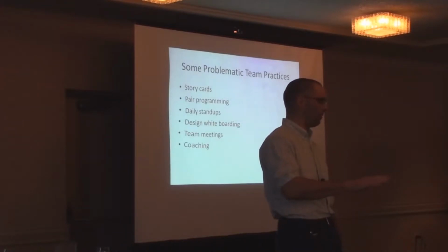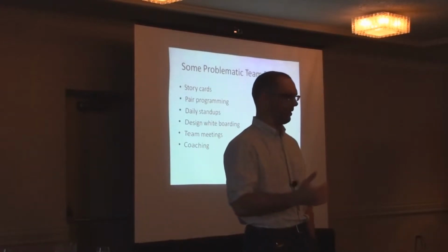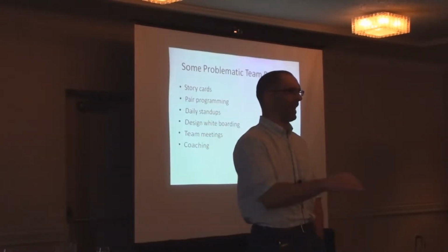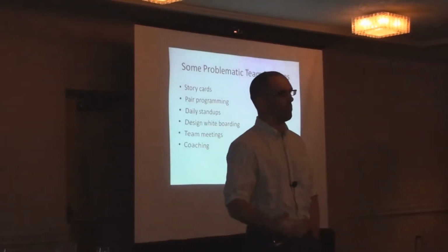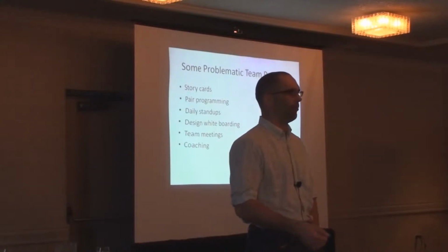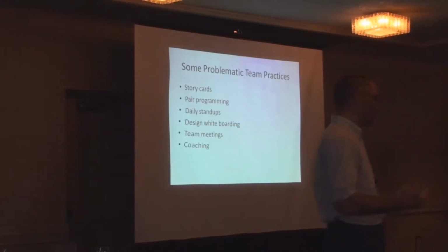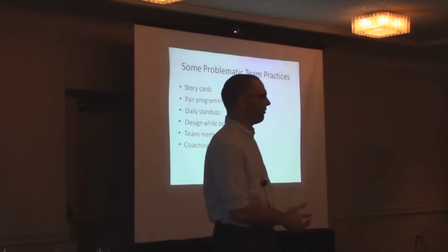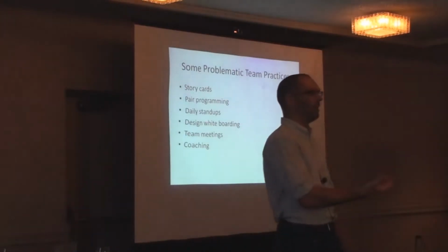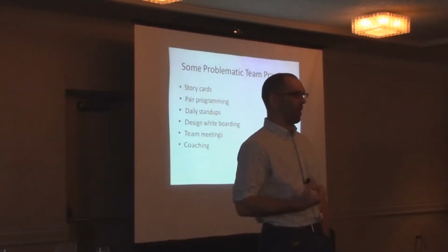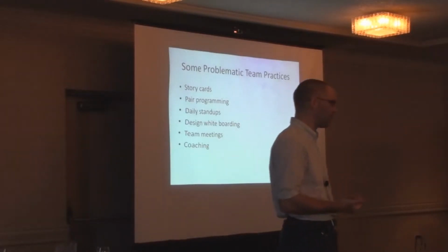Hang on, Pablo. You did what? And he was, I did this. It's like, I was on the card. No. That's all wrong. You're going to have to back that out of TFS and throw it all away and start again, and we're going to have a conversation now about what we actually meant by the stuff we put on that card that said, build a logging infrastructure. They were better than that. But do you see what I'm saying? That's actually a placeholder for a conversation, not a spec. And it's very easy to take away that communication component and be left with this teeny tiny piece of paper that you're then not backing up with anything else.